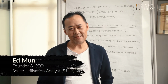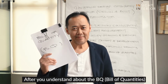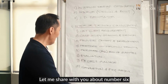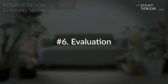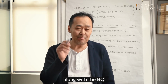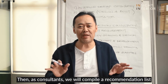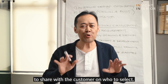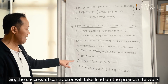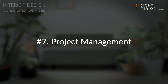Hi, Ed Mun again. Now, after you understand about the BQ, let me tell you about stage 6, evaluations. Our responsibility is to do evaluation based on the drawing and the BQ that submitted back to us. You see? So then we will do a recommendation to our customers on who we should select. The successful contractor will take on the project site work, which is stage 7, project management.